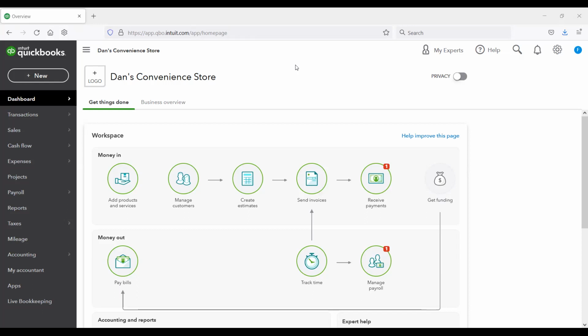You'll see, like we did one for the county of Stanislaus, and they have somebody sitting there. It says it has to be delivered by 5 o'clock by Stanislaus County clock time. Meaning you might say, my cell phone right here says 4:59. They say we go by our clock, so people can't do that. It has to be turned over physically to the person receiving it by that time.